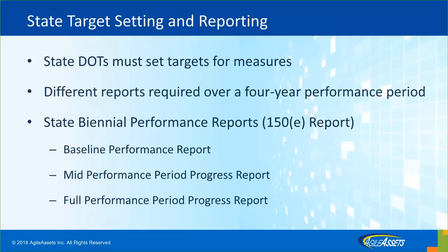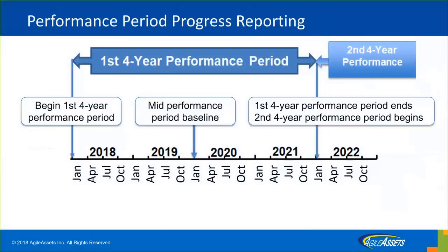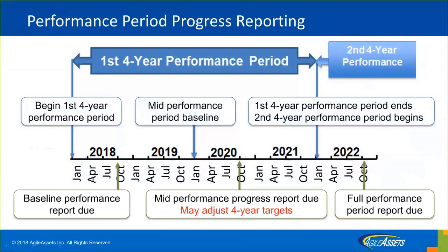Four reports are required. The first is a baseline performance report — you need to know your current standing as of today, your two-year target, and your four-year target, and submit it to U.S. DOT. This is the timeline for those reports: on October of 2018, 2020, and 2022, they need to submit the initial report and then progress reports to show how they achieved those targets.